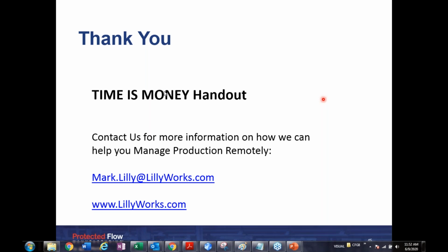We also get into the situation called build a buffer, where you can start with a base amount of time, and then you look to the work center master for each of the work centers that this job is going to go through, and add a certain number of hours or days to the buffer. So you're building a custom size buffer specific to this routing that this job is going to go through. Hopefully that answers it. I might have gone too deep, but that should answer your question on that.